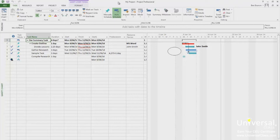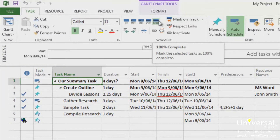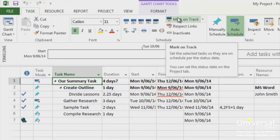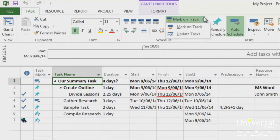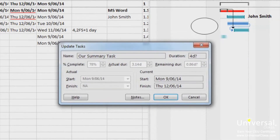The first of these methods exists under the task tab. The blue buttons shown here let you mark the completion of a task by a percentage. If you click Mark on Track, Project will record activity for a task automatically to the status date as scheduled in the baseline. You can also select Update Tasks from the Mark on Track drop-down option. When you use this, you will see a dialogue box where you can find and enter information about your progress, start or finish dates, and duration.